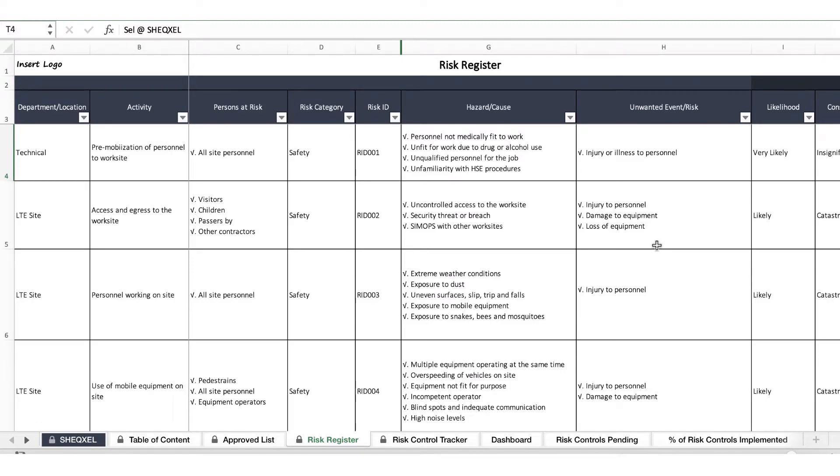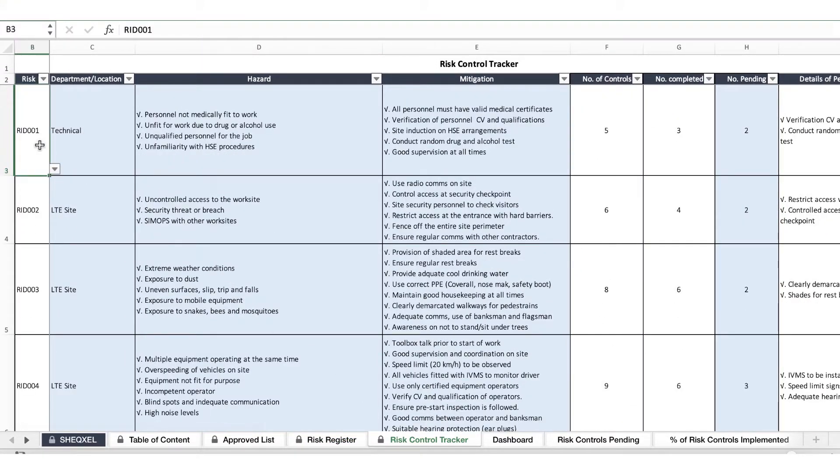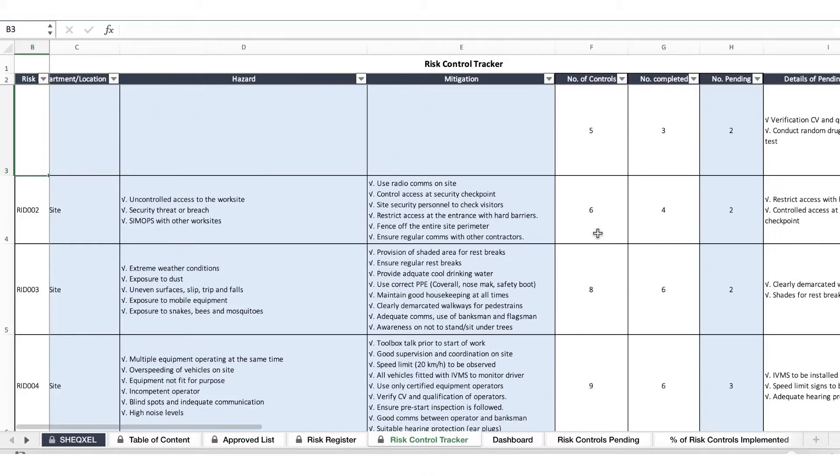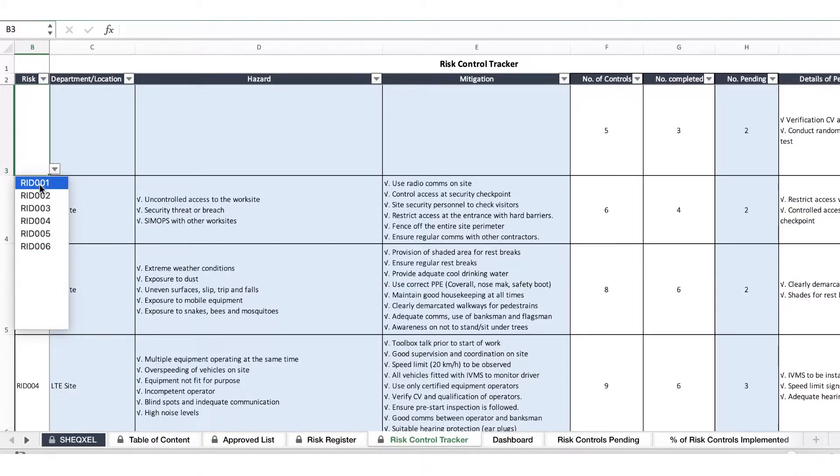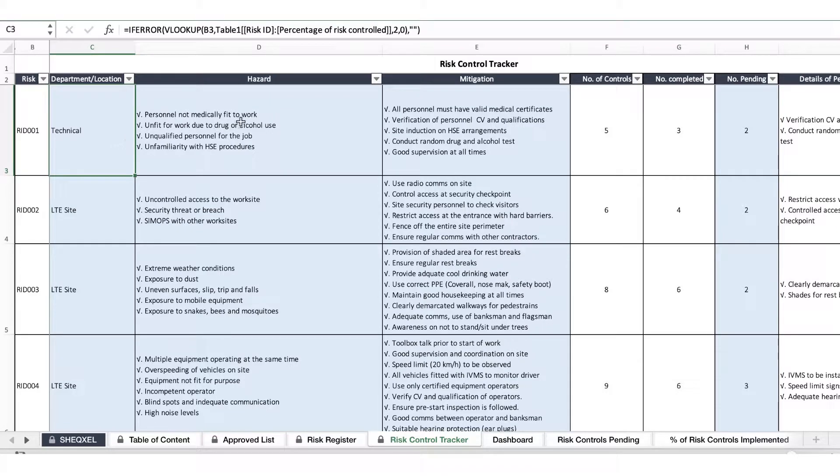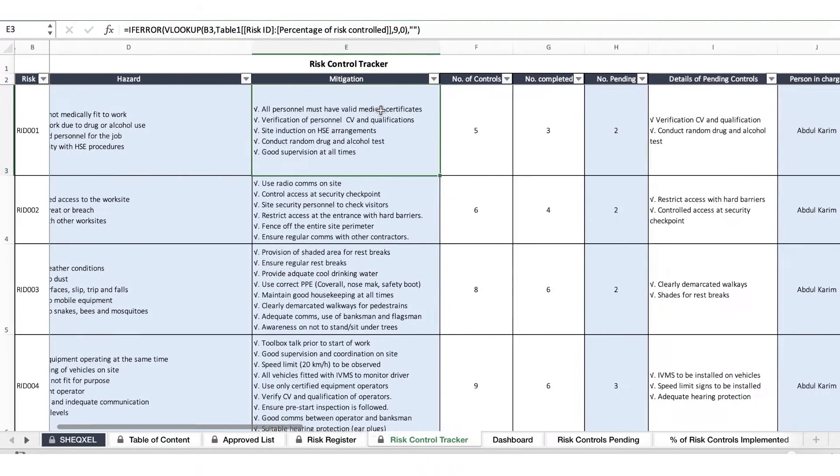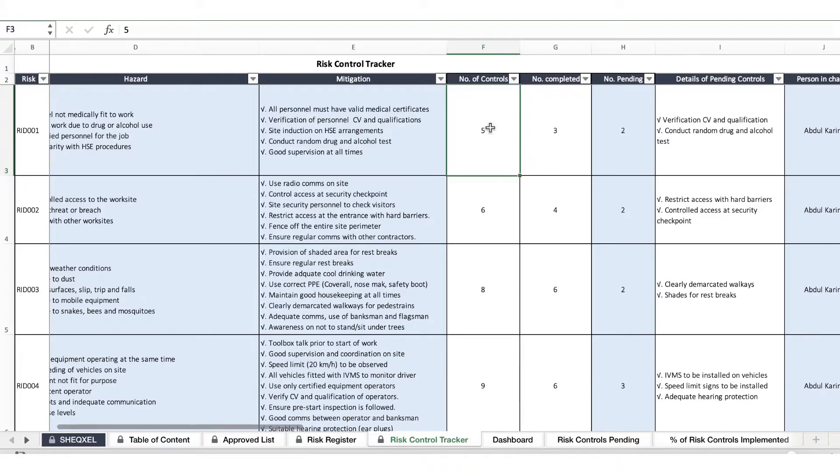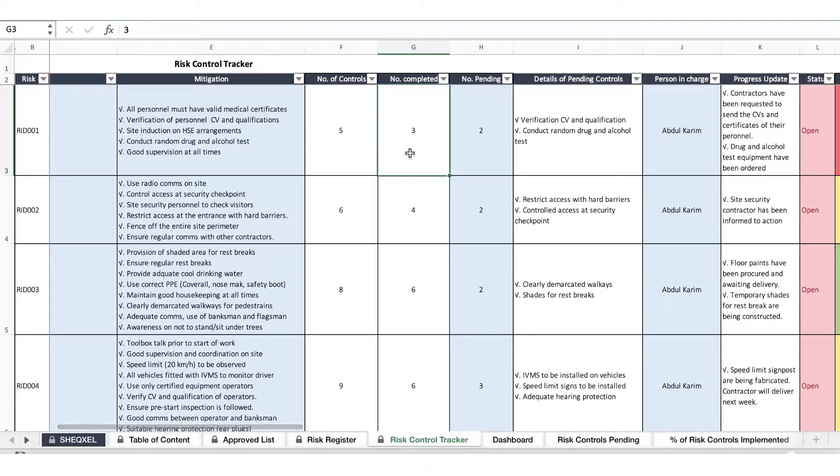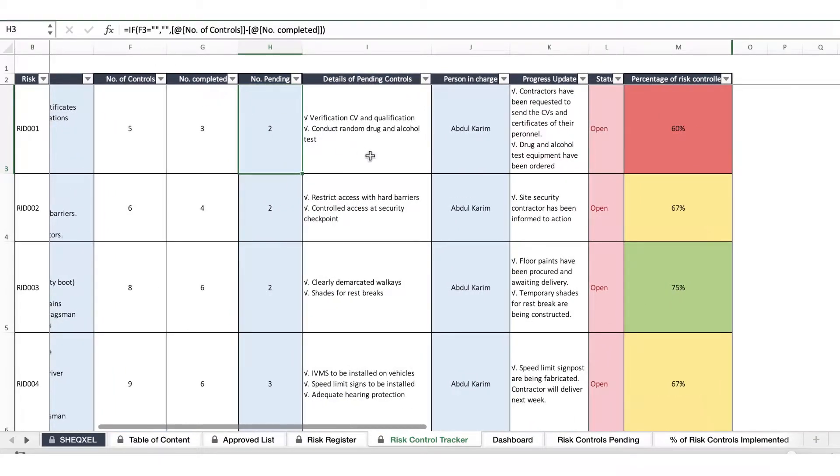There's a comprehensive risk assessment that you would do to have a full overview of your risk profile within your organization. What is interesting to note is that you are able to effectively follow up on the control measures for each risk that has been identified. By just selecting the risk ID automatically the reports will populate the date, the location, the department, the hazards, the mitigation, and you count the number of mitigations and provide the number right here. You indicate which controls have been implemented.